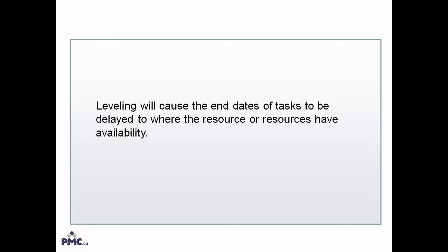Example, replacing the overallocated resource with one that is available, or it may simply be a question of authorizing some overtime. One thing we want to avoid is building a schedule in the planning phase with overtime. Doing so may require even more to be added during the execution phase of the project.